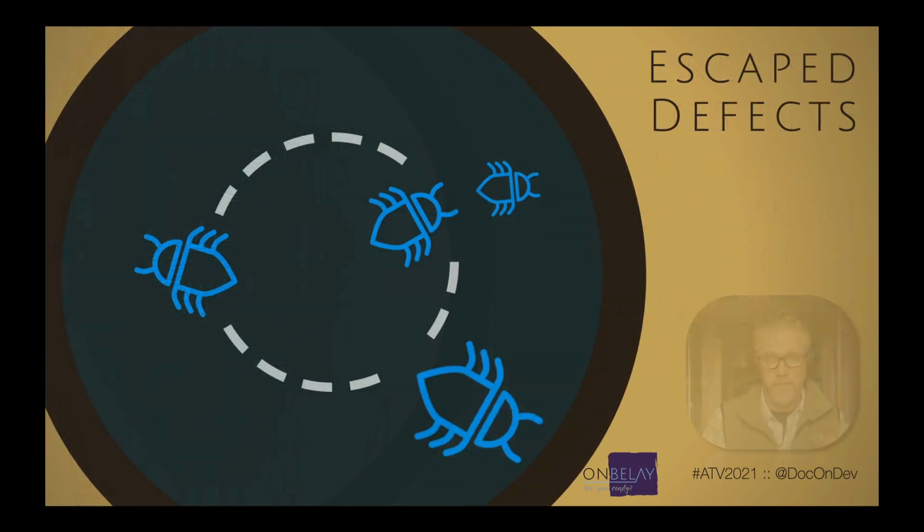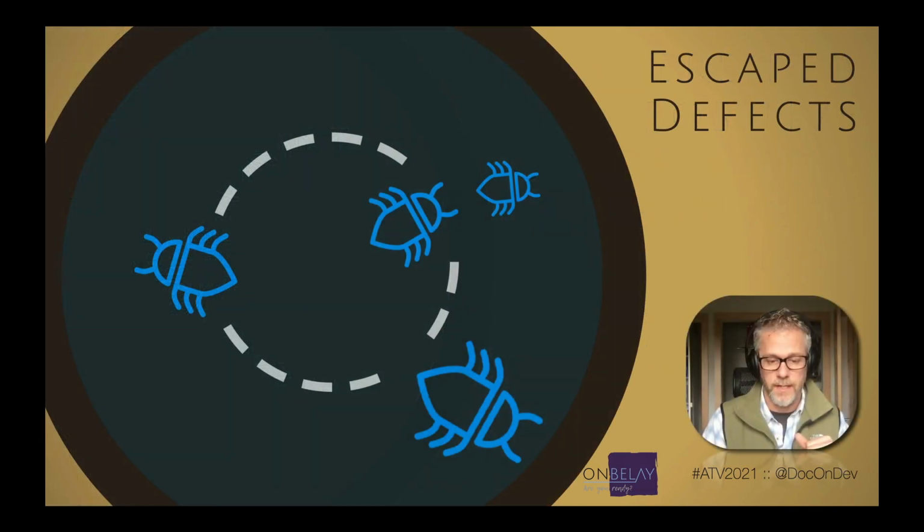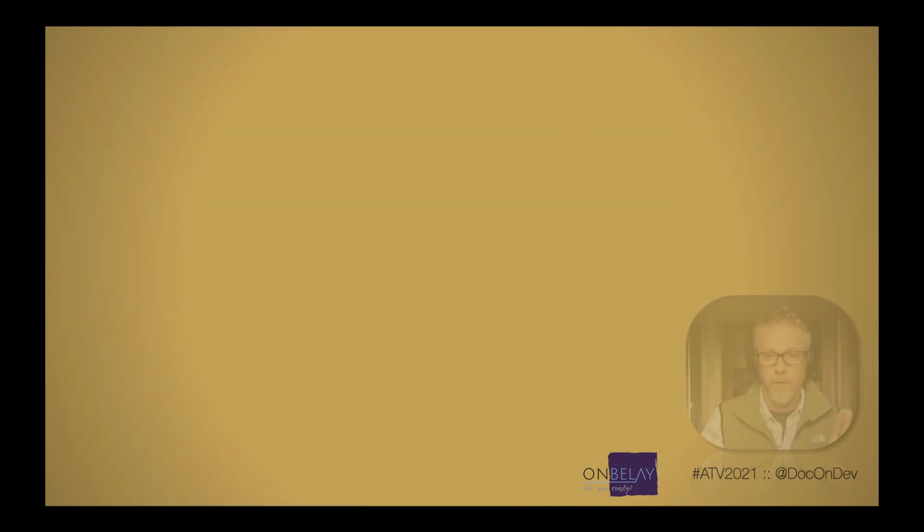Speaking of defects, another thing that we can measure is escaped defects. It's great to know, hey, how many defects did we get in this last iteration? Or how many were sourced in the iteration prior, etc. Escaped defects are those that make it into production. So it's not development, not UAT. Those aren't escaped defects. I don't consider those defects at all because they're part of our process pre-release, but I get that lots of folks do because release comes much later. Doesn't matter. We're talking about defects that are found in production. Go ahead and graph those.